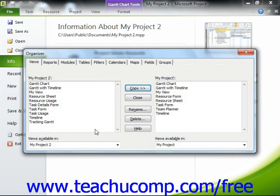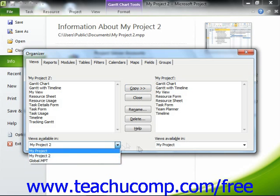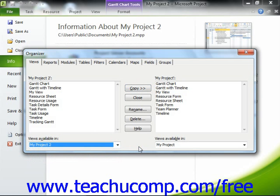Also note that if you copy objects into either the Global MPT or Global Plus Non-Cached Enterprise project files, you are actually copying objects into the Global template that is used as the basis for new project files that are created in the future. If you are using Project Server, you may not be able to copy elements into the Global Plus Non-Cached Enterprise template due to network security settings. However, if using a standalone copy of Microsoft Project, you can copy elements into the Global MPT file. Take care when adding, renaming, deleting, or otherwise editing elements within the Global template files, as this will affect the content available in future project files created from that template.